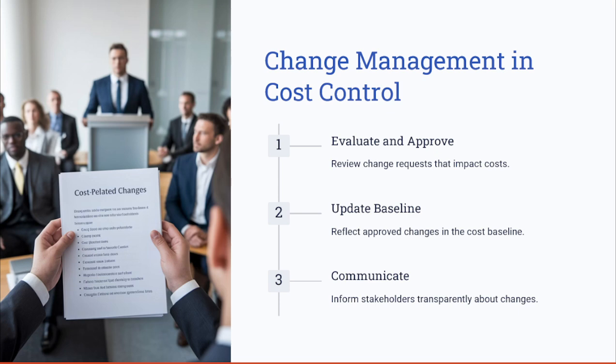And if you recall, to ensure that your project is realigned or rebased to the baseline, you will sometimes need to follow the change control process by submitting a change request, understanding its impact on the project constraints, then evaluating and recommending approval of the change request to realign the project cost to its baseline.